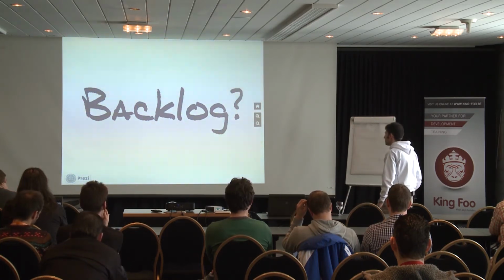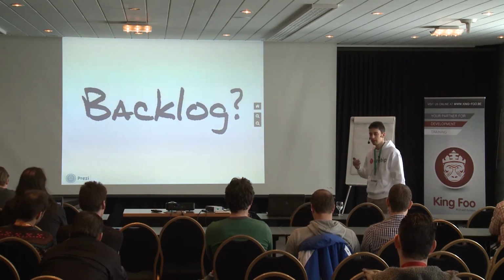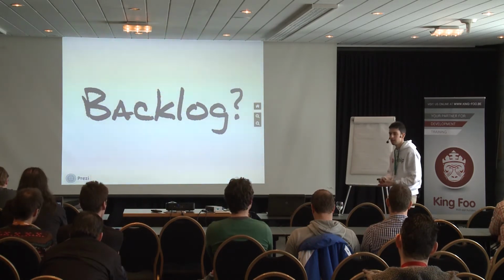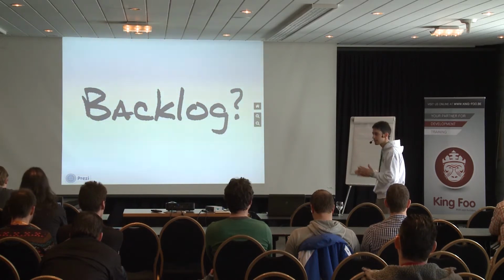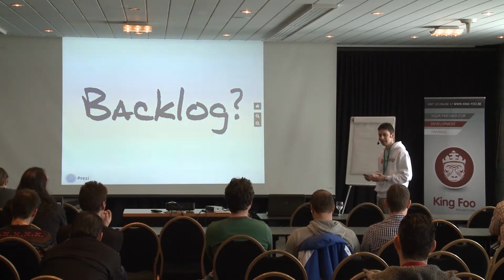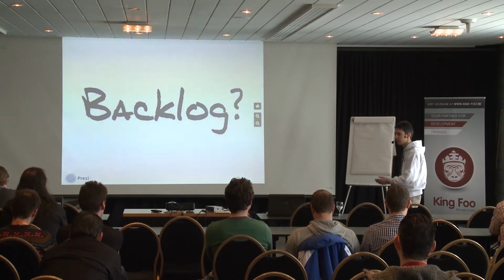This may remind you of backlog work, because if you're doing Scrum or XP and someone comes to the product owner and says, I want this new feature, you won't interrupt what the team is currently doing, but you will add this new feature or this new idea to the product backlog. After the current sprint finishes, so on average 1 week, in the worst case 2 weeks, work will be reprioritized, and this feature can be inserted in the next sprint backlog.